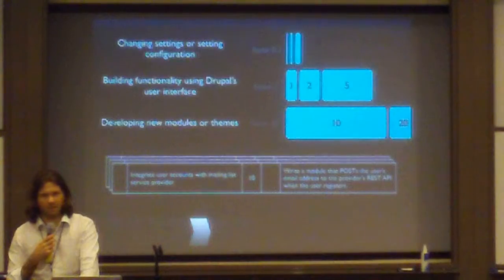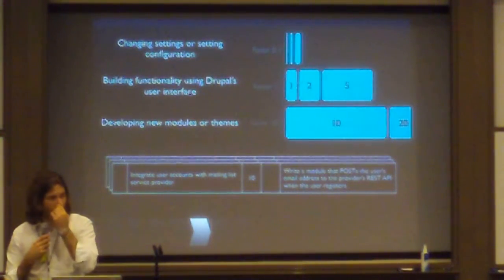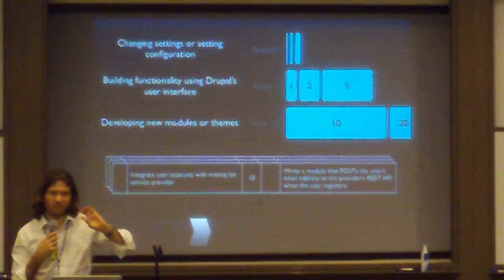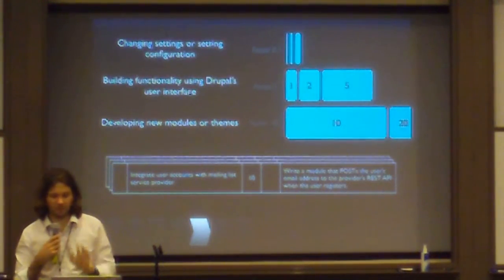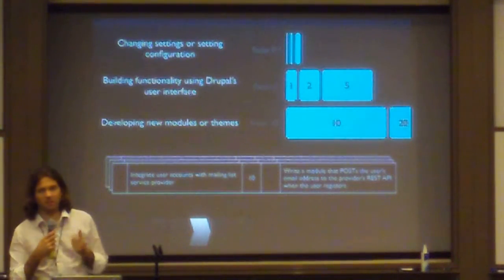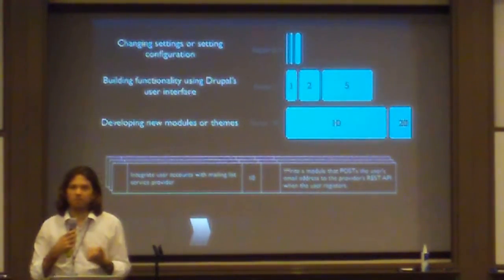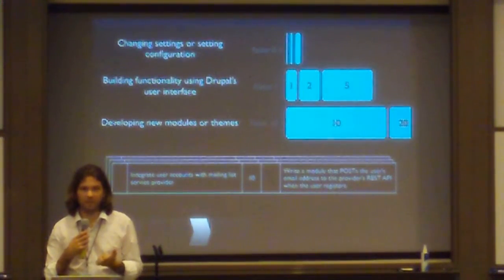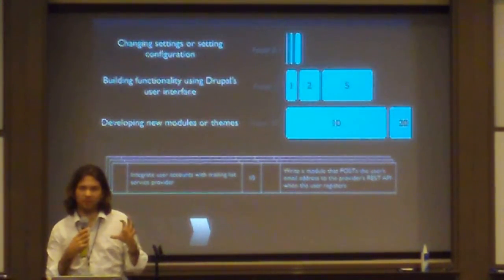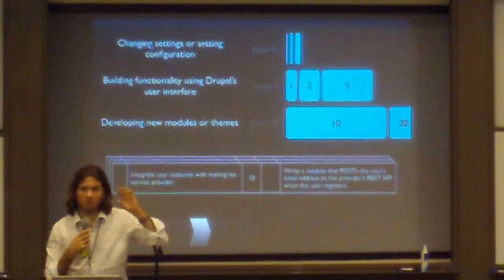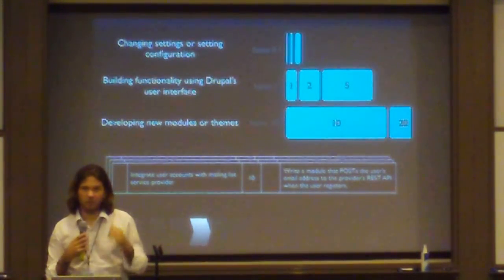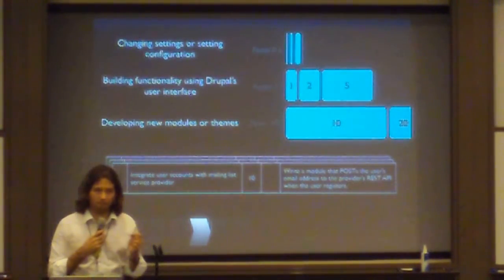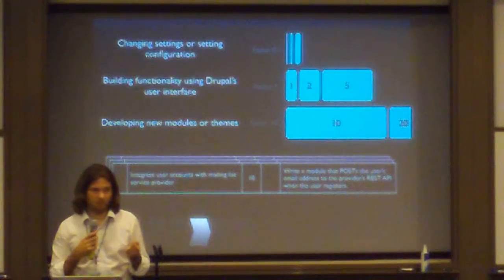So when you have estimated all these different features, it's time to actually rate the solution, how well you know it, and that's when we take the uncertainty into account. Uncertainty in estimation comes from 2 things primarily: the requirements, the clarity of them. The refinement of the requirements will improve as the project progresses. I will show a diagram of this shortly. Secondly, whether you have done it in the past.